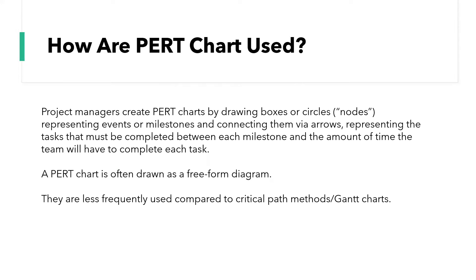That leads us into how they are used. Project managers often create them by drawing boxes or circles, and these are known as nodes. These nodes represent events or milestones, and they're connected via arrows, which represent the tasks that must be completed between each of these milestones and the amount of time required to complete each task. It's often drawn as a free-form diagram, and I'll be showing you some examples in future slides.